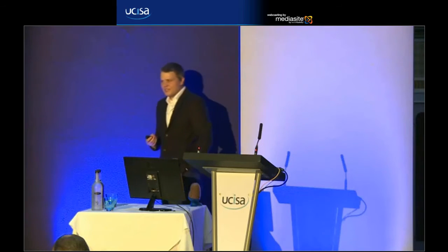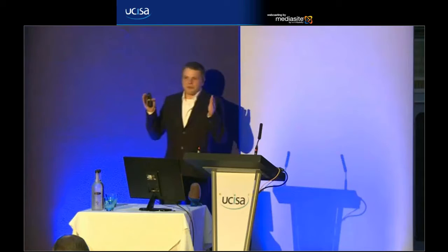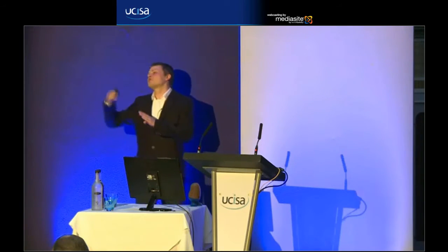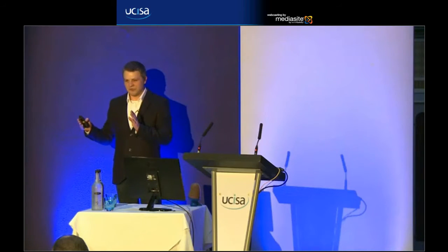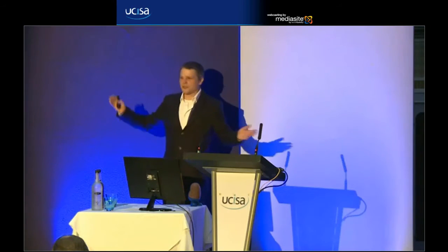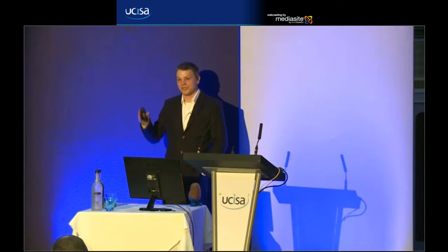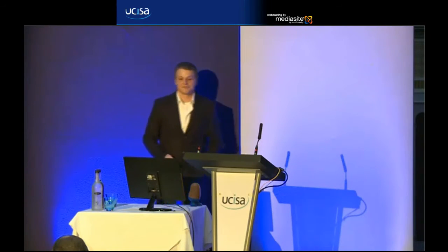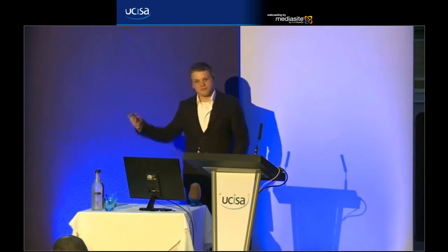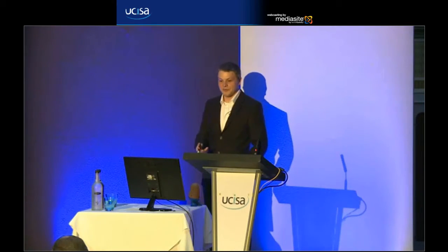The fixed sprint length was important, this 3-week period that we fixed on. When we first started, there was a tendency to go, oh, we've got to the end of the 3 weeks, we haven't quite finished. Let's just add another week on. That'll be fine, won't it? That doesn't work at all, because then all your estimation goes out the window. You've got to be strict about it. If you've fixed your iteration length, that's what you fixed to. If you haven't managed to meet everything, they roll over into the next iteration. As I mentioned there, we resist mid-sprint additions for the same type of reason.